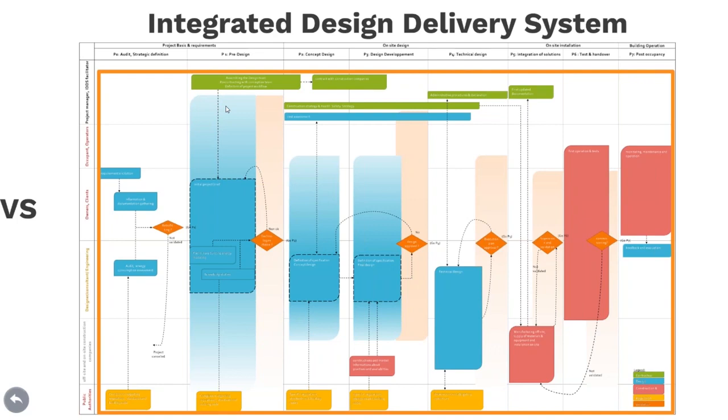So the sooner they are included in the project, the sooner they can participate in the design and minimize the risk for realization. This way of setting up the project and contracts allows to improve the engagement of stakeholders from the very beginning, and thus to increase the probability of the project success. It's also a good way to share the risk for operation with strong innovative partners, and in particular, for example, for the GEOFIT project.